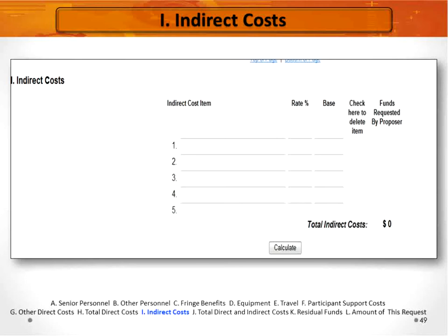Okay, every institution receiving a grant award from the NSF must include indirect costs in the budget. This is money from the grant that helps support the business office and other functions of the college, and including indirect costs is mandatory. You need to determine if your institution already has a rate established. These rates change over time, so make certain that the one used in your proposal is current. During the funding process, you will be asked to provide verification of your rate.